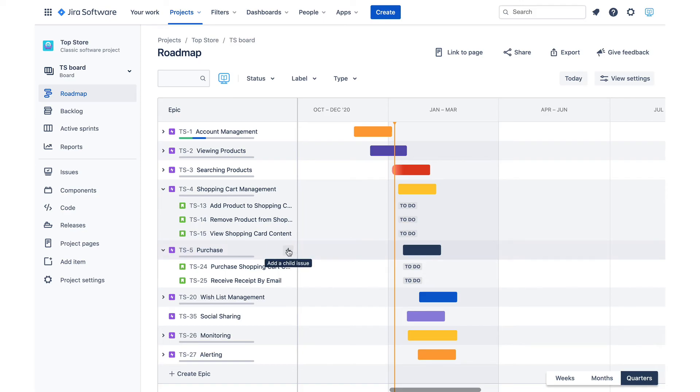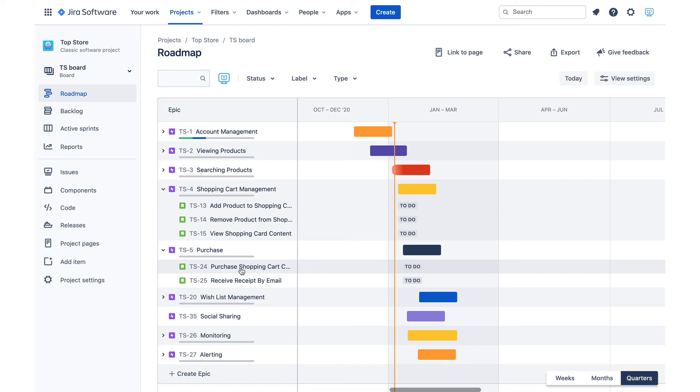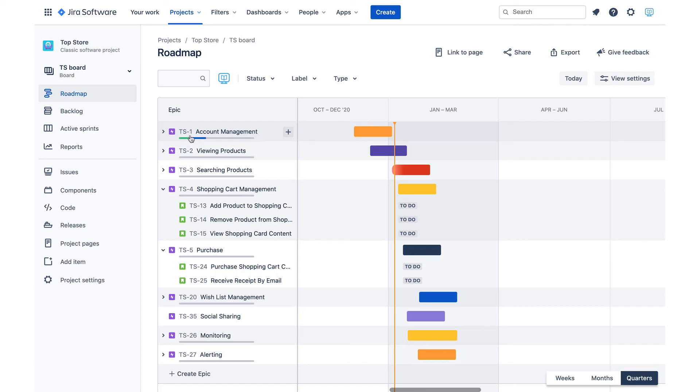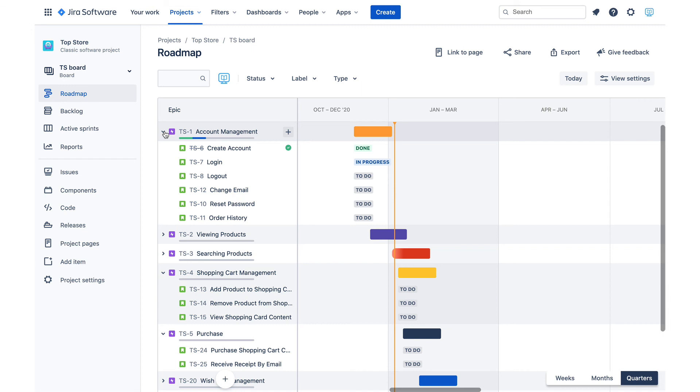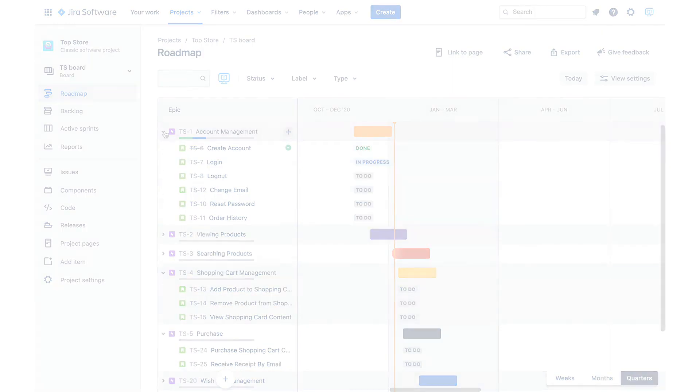Like everything else in new Jira screens, this section also supports inline editing. Epic's progress is indicated in the roadmap and it is evaluated from the statuses of its child issues. Under account management epic, there are green and blue bars. Green reflects the number of completed child issues, while blue indicates how many are in progress.